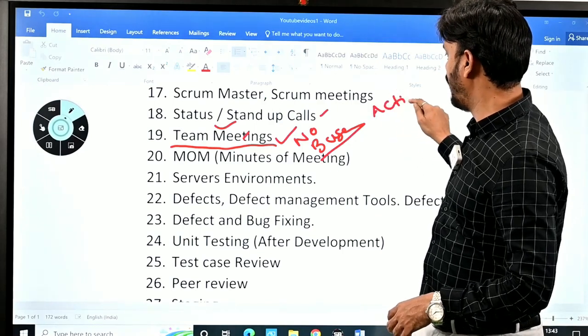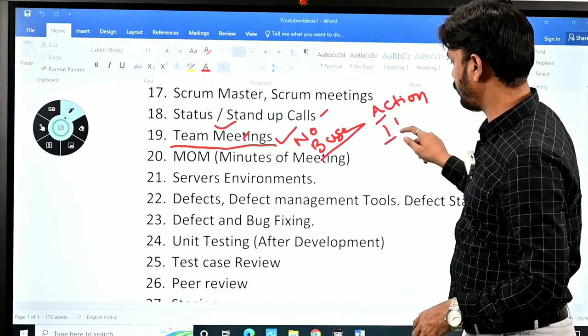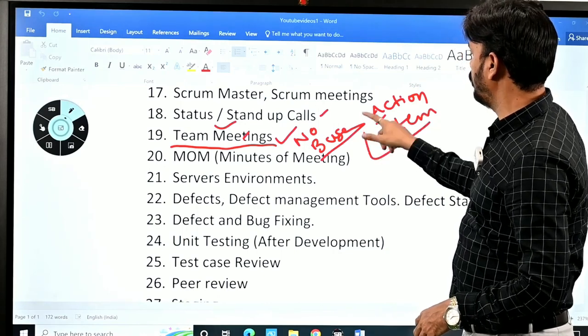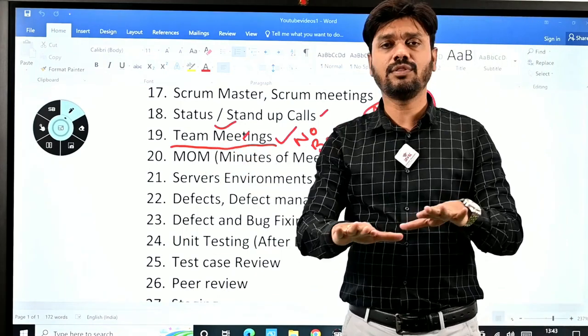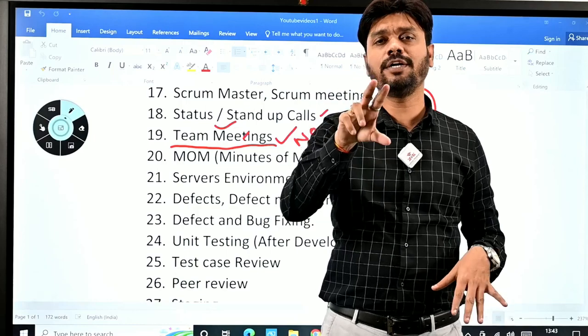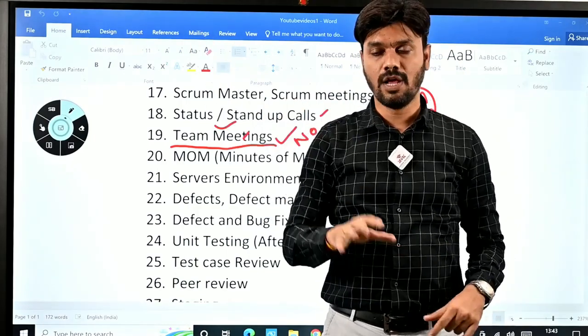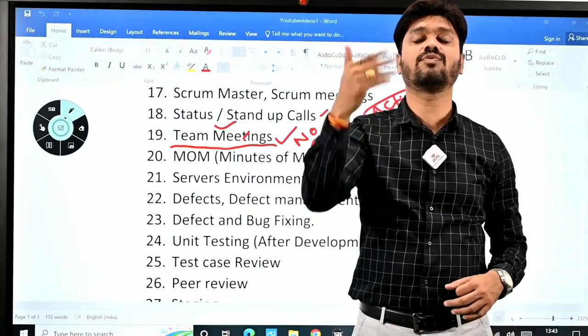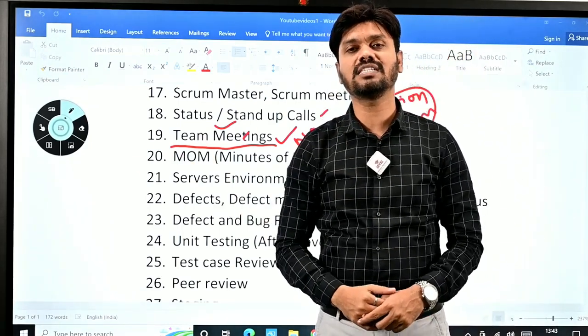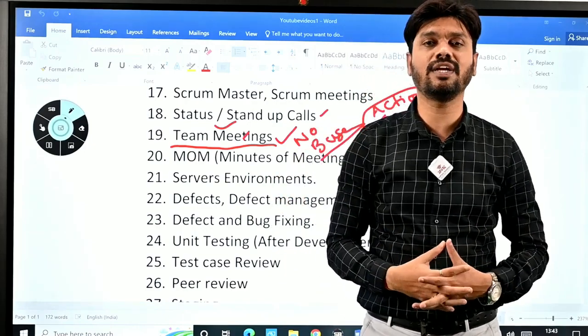It is called an action item. Okay, so here I am done with the requirement. Story points 2 and 3 are done. For one, I am waiting for some dependency from the database team, and the fourth one I have to start only once story point 1 is completed. This is my status that I have told in the team meeting.